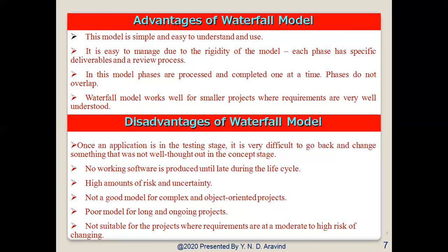Now, where can we not use this waterfall model? We cannot use it for large products where the requirements are not well understood, or where changes come for any reasons such as external changes, changing expectations, budget changes or rapidly changing technologies. In such situations we cannot go for the waterfall model. We cannot go for it for real-time systems, for event-driven systems, or for leading-edge applications. These are the places where we cannot use the waterfall model.